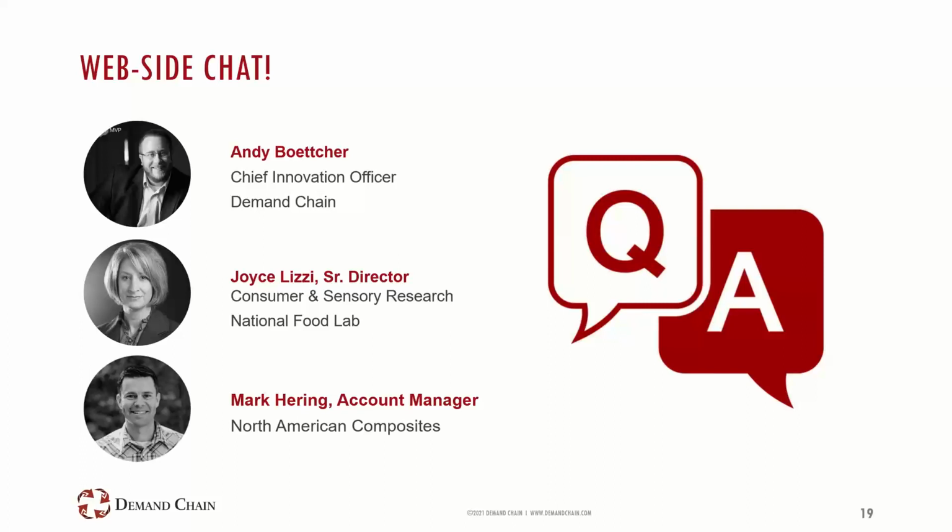I can go first on that, I guess. The one thing I would say is when we started this, we had a really big scope. We wanted not only to do the recruiting engine, but do a lot of business management and process management in the system. I think we got the recruiting side really good, and it was the most critical, so we put a lot of attention there. On the business process side, I think we had to do more iteration, and maybe we overcomplicated things in some ways, and focused on trying to gather all information in the system related to that versus the most important information in the system.